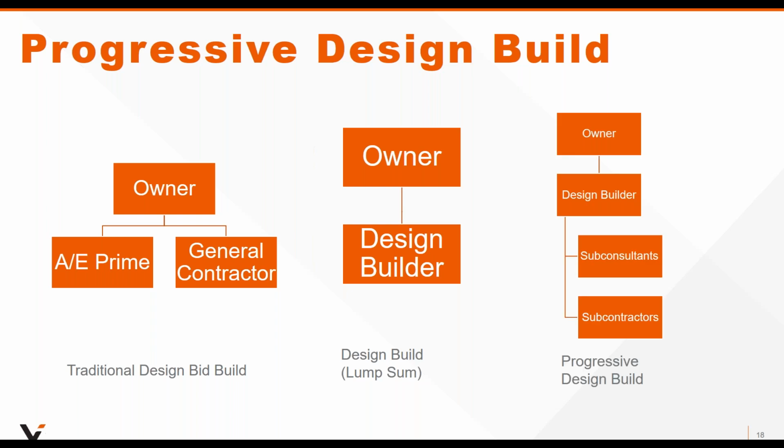And progressive design build tries to bridge this situation where the owner actually engages with a design builder who has a design team already in place and pays for their services, so that as the design builder is providing solutions, the owner has meaningful input as the solution progresses.